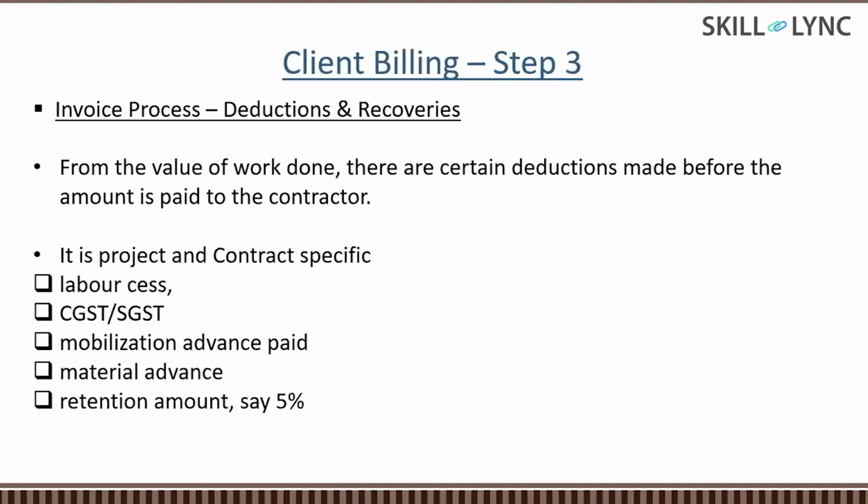the retention amount. In most contracts, most projects, the client will be holding some 5%, or in very few projects, 10% of the project bill amount, which they will be releasing at the end of the project. So that is the retention or safety amount that they will be holding. All right. So all these deductions will be there.